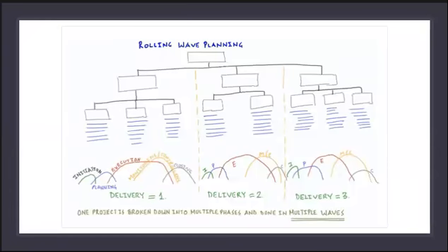Now, not all projects are waterfall-like, so sometimes in an evolutionary or iterative-like project life cycle, the entire work breakdown structure is not available up front because it's only being discovered as the project progresses. So the work breakdown structure would be decomposed progressively as the work packages become more apparent, which is popular in agile or other adaptive life cycles.